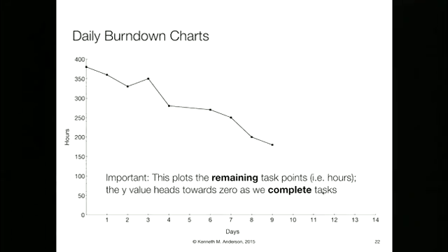And that way, okay, we're not going to stop the iteration and replan, but we know now 2 tasks are not getting done. 2 stories are not getting done. We're going to have to bump those, but let's get these other ones done, right? And so you can rally and try to get that done. You don't get to 0 because you're always going against what was planned for the iteration. You don't want to keep making your goals change mid-iteration. Stick with your targets in that iteration. But slowly but surely, it starts to tell you the story over time, and you get used to it. It becomes a kind of an ambient motivator in the environment.